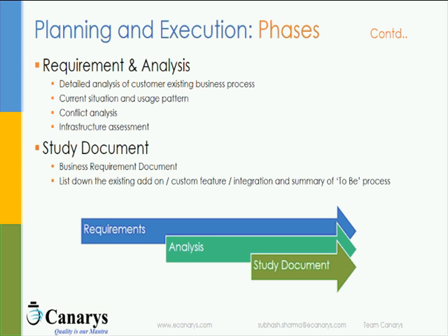It helps us list all the conflicts which we may have due to existing customization in the client database, and based on the conflict analysis, we prepare the conflict resolution plan. This plan is very important because, if we don't clarify which customizations we need to carry forward, it is a very tough decision for us to draft or finalize our business needs.